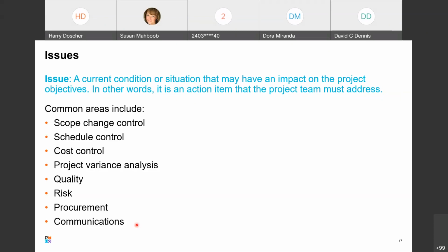If you have a change in leadership, either for your customer or for your own internal leadership, always take a look at what their preferred communications method is and make your changes and document them. If the new leader wants a verbal readout every 2 weeks and you've been supplying a stoplight chart every week, you've got to change some things. So that would be an issue that you'd have to deal with.